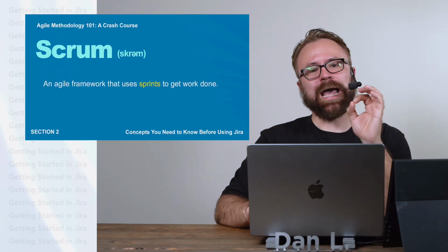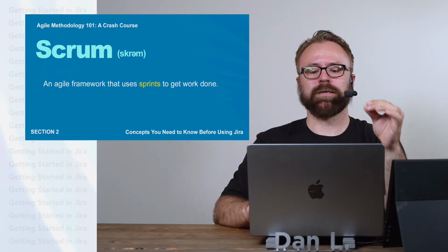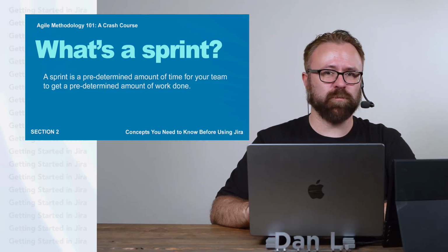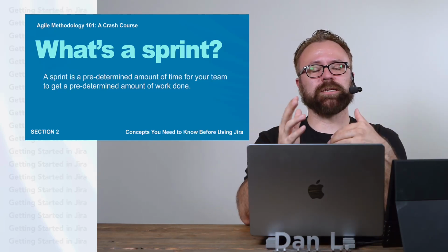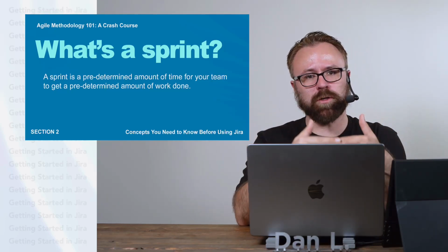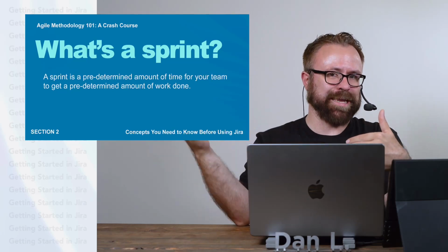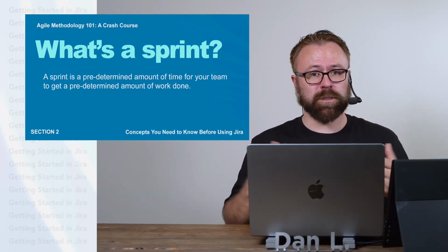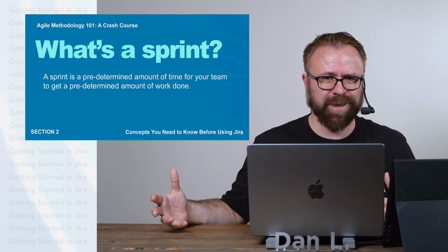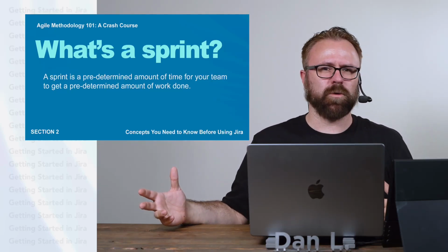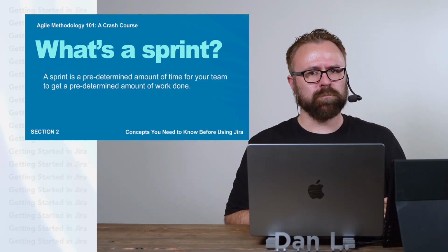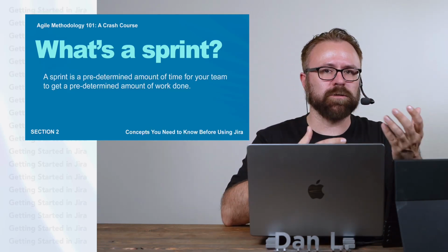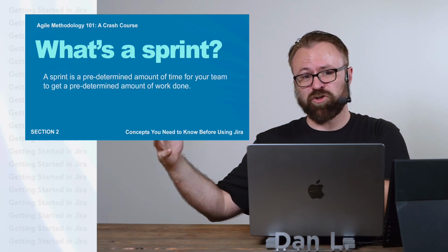And that difference has to do with something called a sprint, which begs the question, what's a sprint? So a sprint is a block of time that your team will use to decide how much work gets done. Right? So some teams might prefer a 1 week sprint. I've worked with some teams who choose to do a 1 month sprint. It's pretty rare to go more than 1 month. I'd recommend starting shorter, maybe a week or two, and then you can always decide to change that time period if your team feels it's not meeting enough or maybe meeting too much.